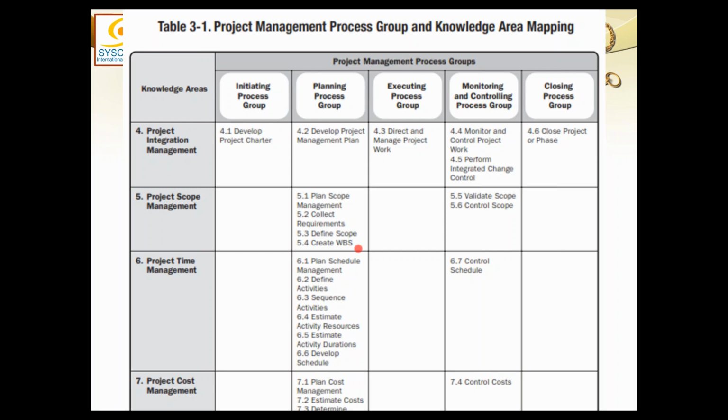Okay. For any plan, the final version of the plan, once you have done all the steps in planning and the last step is completed, that means your detailed plan is complete. That is the point where you should declare it a baseline. And to declare it a baseline, you have to present it to your boss and get it approved from him. Because if he approves it, then he is the authority who agrees with this plan and who takes the responsibility